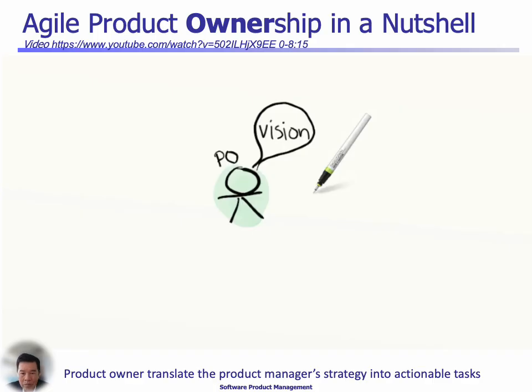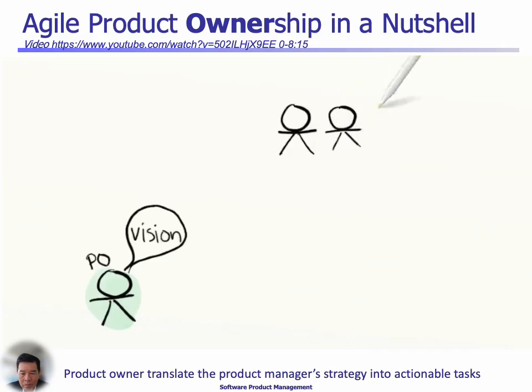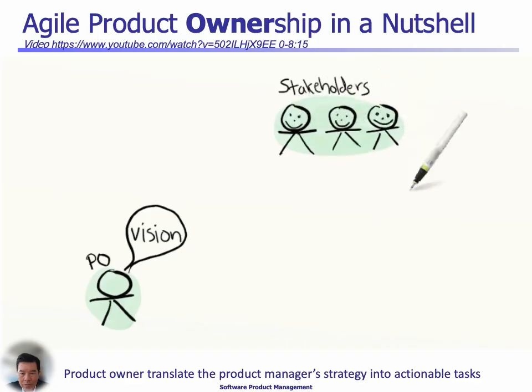She talks about it all the time. Here are the stakeholders. They're the people who are going to use and support or in any way be affected by the system being developed. Pat's vision is that these people here will love our system and use it all the time and tell their friends about it. The stakeholder needs and Pat's ideas are expressed as user stories here. For example, if this was a flight booking system, people need to be able to search for a flight, and maybe that would be one user story. Both Pat and the stakeholders have lots of ideas, so Pat helps turn these into concrete user stories.